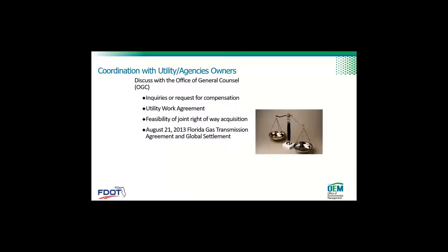And if one of these 4 things comes up, then it needs to be discussed with the Office of General Counsel. So that's inquiries or requests for compensation, utility work agreement, feasibility to join right-of-way acquisition, and the August 21st, 2013 Florida Gas Transmission Agreement and Global Settlement.